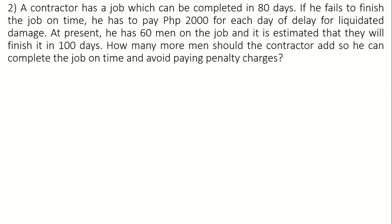Let's read carefully. A contractor has a job which can be completed in 80 days. If he fails to finish the job on time, he has to pay 2,000 pesos for each day of delay as liquidated damages. At present, he has 60 men on the job and it is estimated they will finish in 100 days. How many more men should the contractor add to complete the job on time and avoid paying penalty charges?